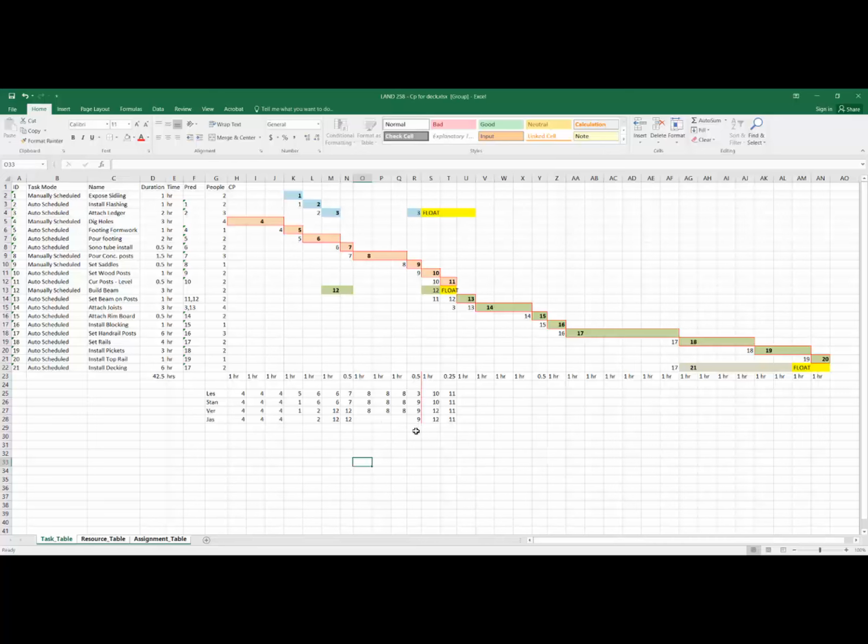So at this point, what you need to do is go through the rest of the assignment, fill out the number of hours, and wherever it allocates 2 people to a job for a certain time period, so for instance, number 17 is 3 people, well, maybe we need to get 4 in there, but then we've got to determine how many hours. So if 3 is 6 hours, that's 18. How much is 4 people? Well, you divide 4 into 18 to determine how many hours this should take, and that will change the critical path as we work through this project.